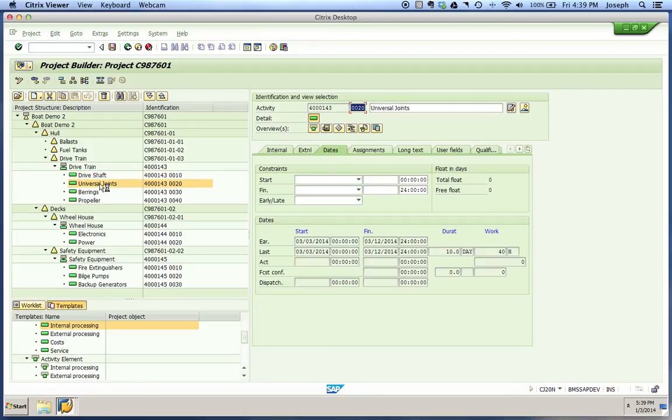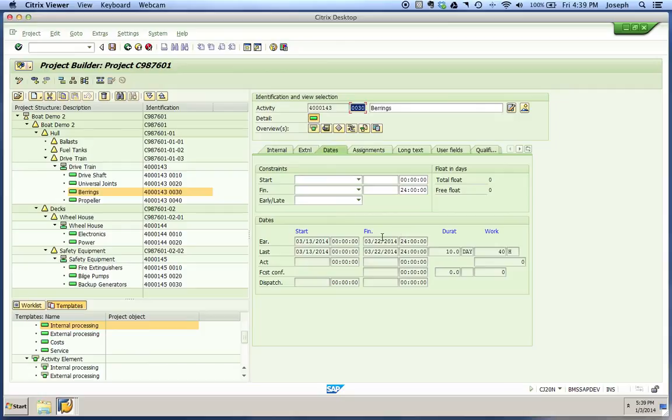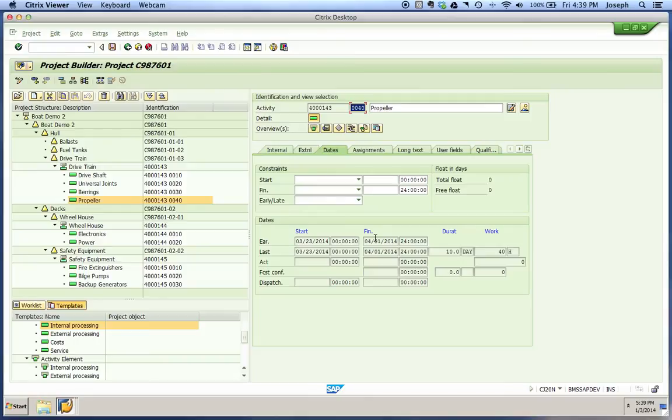You'll see this one starts on 3-3 and ends on 3-12. We had a start-start relationship here, so it's also 3-3 to 3-12. When we move to bearings, you'll notice bearings were a finish-start between the universal joints and when they can begin, so they start on 3-13 and end on 3-22.